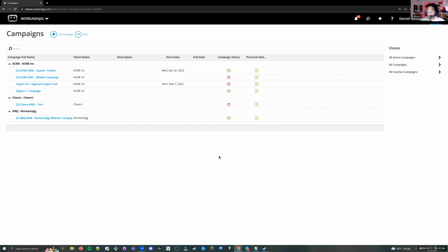So, with a project, you have your schedule, you have your estimate. It's one project. The way that we typically recommend that you set up a project in Workamajig is through templates. So you would templatize your common project types to basically set what the schedule arc would typically look like. So what are the major milestone tasks that we need to do? And as part of that process, you'd also add the service required to complete those tasks and the number of hours that it would take to do them.